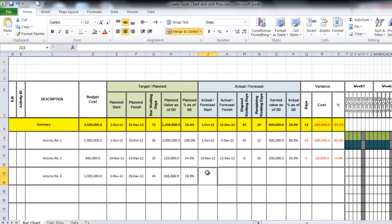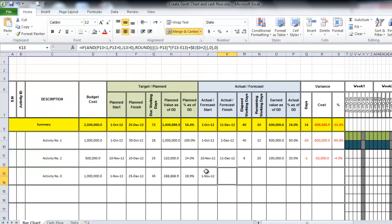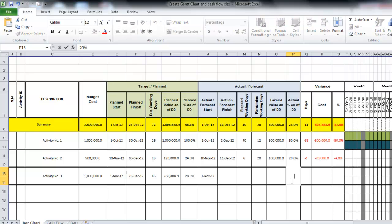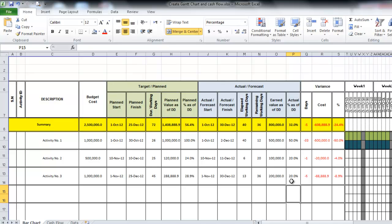In the actual part, we put the actual forecast start — let's say the same as the plan date, 1st November. Don't put the actual finish if it is not completed 100%. Let's say it is completed by 20% — just put 20% here and everything will be calculated automatically.